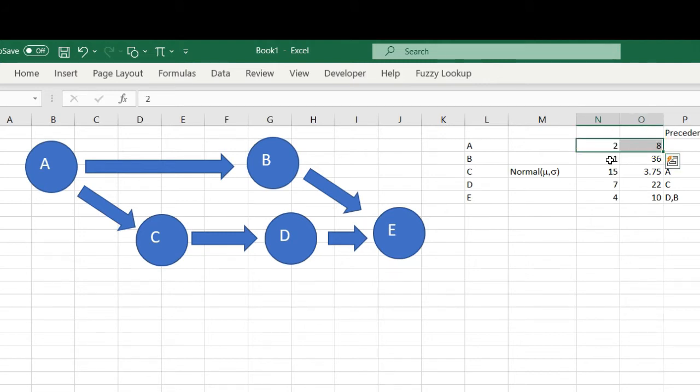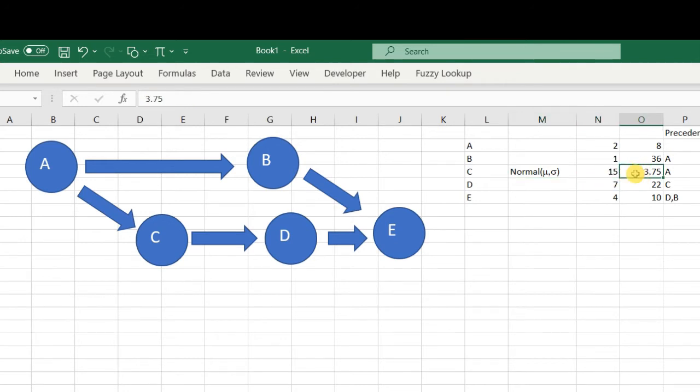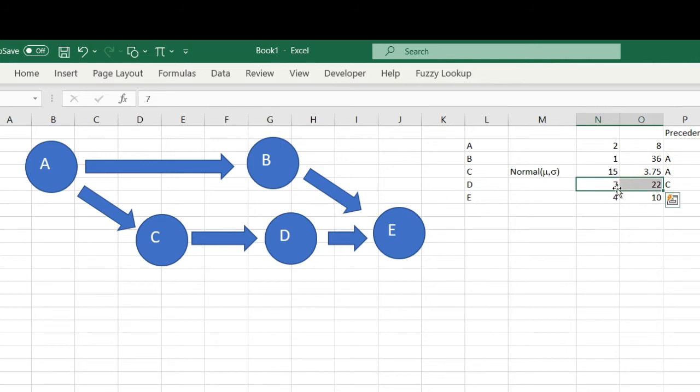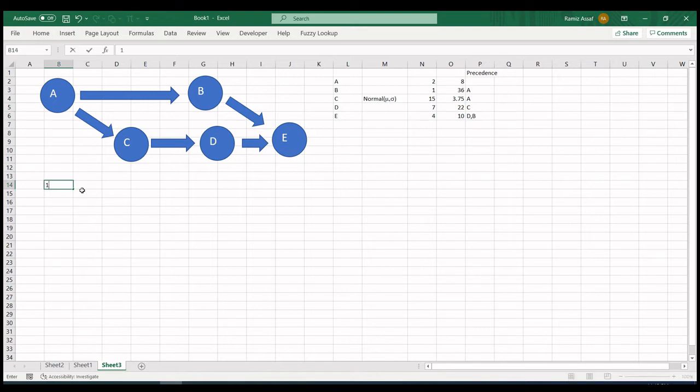Activity C is actually normally distributed: 15 as a mean and 3.75 as standard deviation. Then we have D which is from 7 to 22, and E from 4 to 10. What I'm going to do now is generate a random number of projects. I can generate a huge number here.